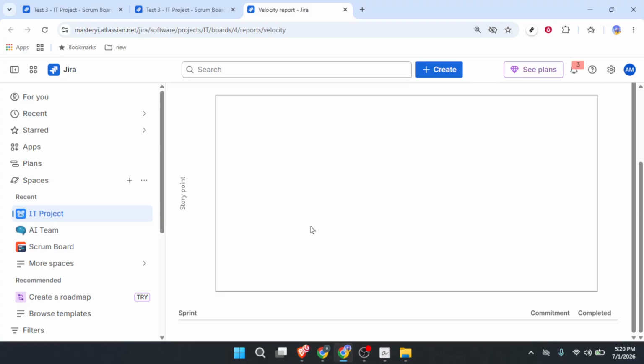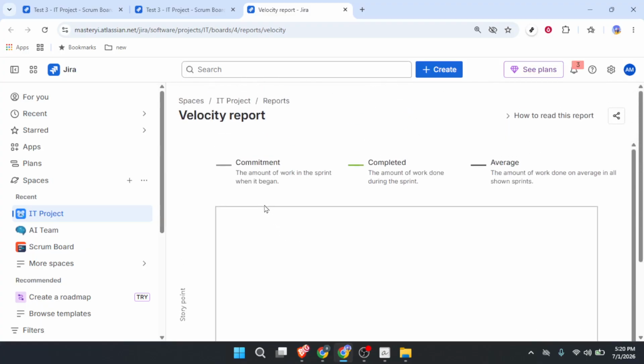So now that we know what the chart means, let's apply it to your sprint planning. When you sit down to plan the next sprint, do not just guess how many story points you can take on. Look at that average velocity line. That number is your realistic starting point. It is a data-driven estimate based on actual past performance. In my experience, the teams that use this number as a ceiling, not a target, are the ones who actually hit their commitments. It gives you confidence. You can look at your product owner and say, based on our last 4 sprints, we can reliably deliver about this much. And if you have a new team member or someone on vacation, you can adjust from there.